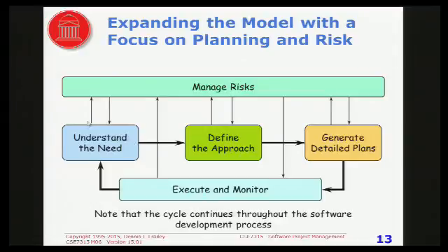Now, you'll notice some of these arrows go up. Those arrows represent management observing or monitoring what's going on. They represent anything you do, having a review, collecting data and analyzing the data, whatever it might be. The arrows that are going down represent management making changes based on their assessment of the risk.